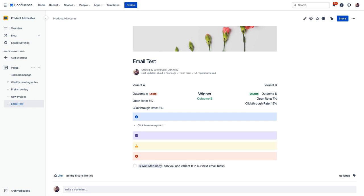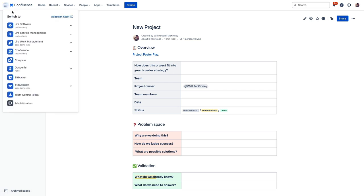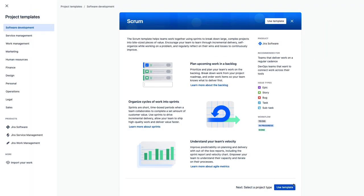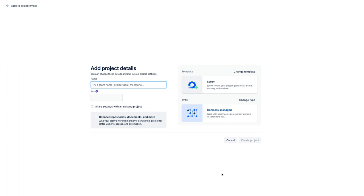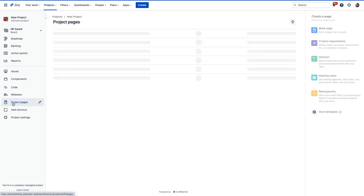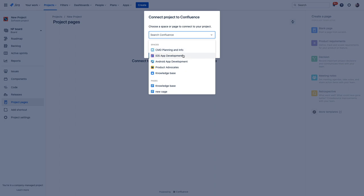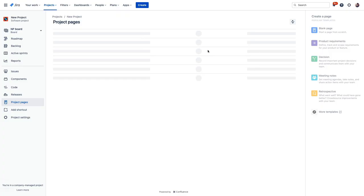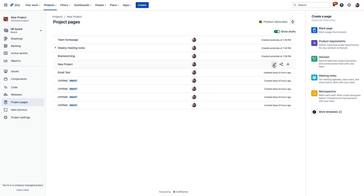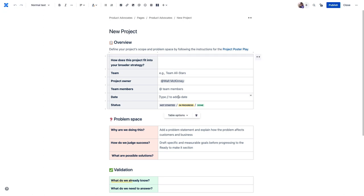Now your project journey might look something like this. We'll create a project plan in Confluence to determine your team outcomes, timeline. To demonstrate, we can just use the poster that we made earlier. Then we would create a project in Jira. So let me navigate over to Jira real quick. And that is going to house all of the work items for that project and assign owners for those work items. You can then link your Confluence project plan directly into your Jira project right here. We'll just select the space that we were in, the product advocate space, and then all of these pages that we had in that page tree, they show up right here for anyone in this Jira project to access.